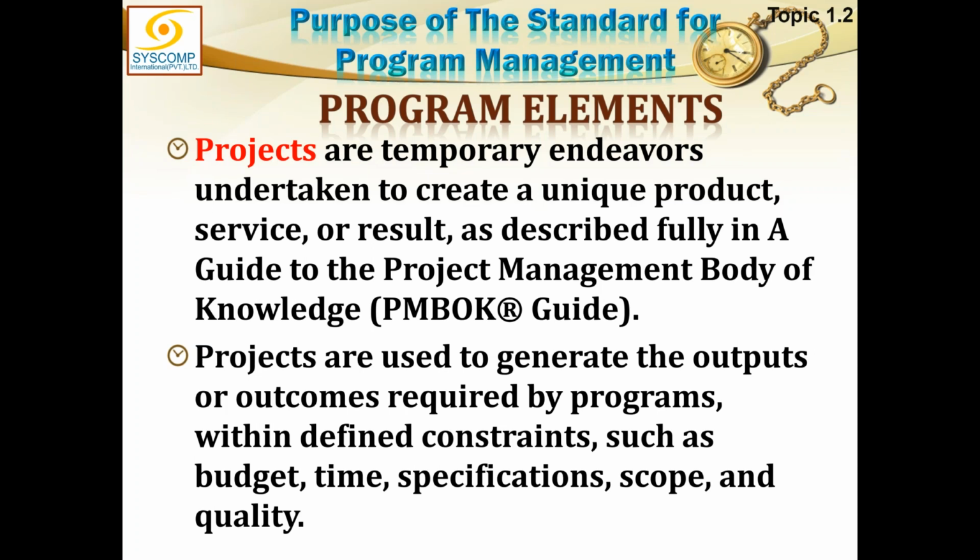I will go back to the definition that Suhail had given earlier. From projects, we do get the deliverables, which are the product, service, or result. Whatever product, service, or result is coming out of a project is basically the output. But if you have any benefits coming out of the project during the life of the project or immediately after the project, these are the outcomes. Outcome is relating to the benefits. As I said before, it might be possible that while the project is going on, certain benefits start yielding, and those benefits which are coming out of the project till the project ends are the outcomes.